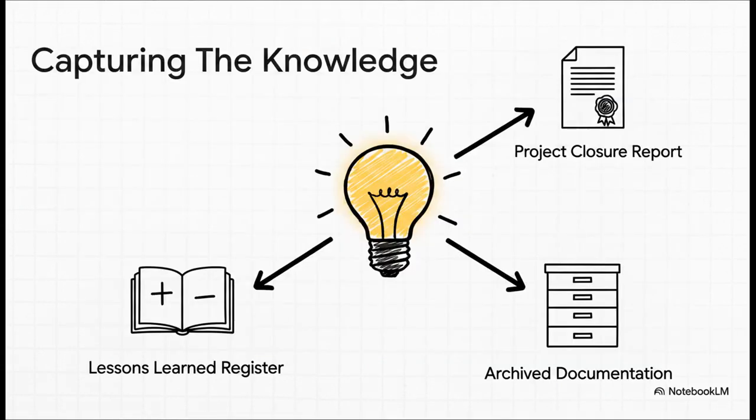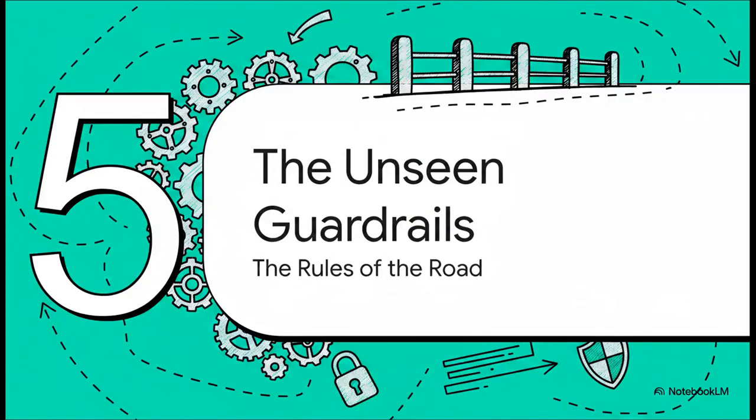And this knowledge isn't just a pat on the back. It gets captured in some really important documents: a final report, a lessons learned register, and a full archive of all the project documentation. This isn't just busy work. It's what makes sure the next team to come along doesn't have to start from scratch and can build on this project's successes.